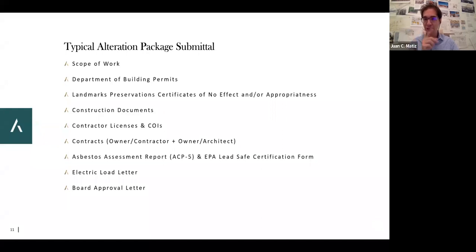The one thing I wanted to also flag from this package submittal that I think is really important, and we face it as architects who renovate in buildings, is the timeframes for the renovation, and the implications of time and penalty clauses, right? I've seen many different variables of this in many buildings, from buildings where they just say, you have 120 days, you have 180 days, and the building will say, shareholder, if you hire a contractor and they don't finish on time, we're going to start charging you this much money per day. And those buildings do have very serious implications.